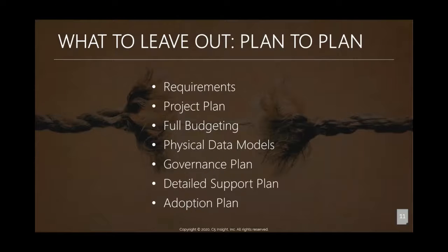Probably just as important to remember is what not to put in the plan yet. Remember, this is an annual plan, or maybe it's an initial roadmap, depending on where you are. So you don't want requirements in here yet, right? You do not want detailed waterfall types of requirements. That's going to come later. You don't need full project plans. You kind of need more the list of projects you're going to execute, or you can call them milestones within a big annual project if you want to. You want to know what projects you're going to get done, about the timing, but not the requirements yet, not the details, just the high level.